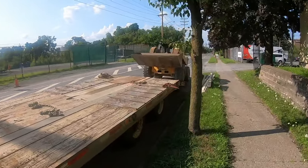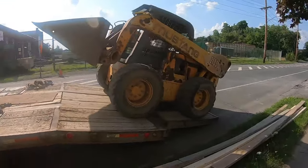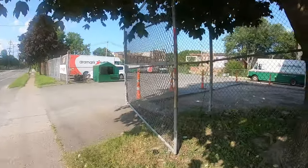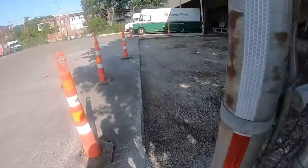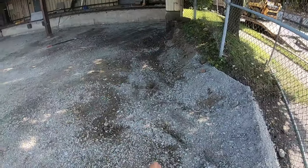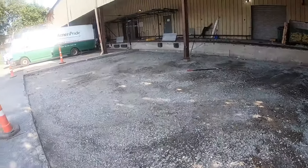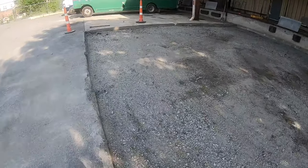At the end of the day, we got everything complete as needed. Mustang going back home, and everything's boxed out. In the morning, we will tamp, set our boards on the inside here because that blacktop is not too true. And we're gonna set a board right here, set a couple grade stakes, and we'll pour this at 11 a.m. So stay tuned to see the pour.